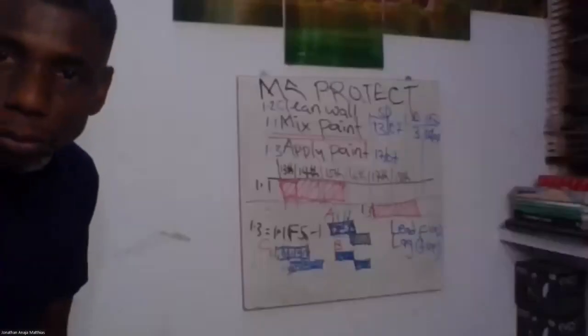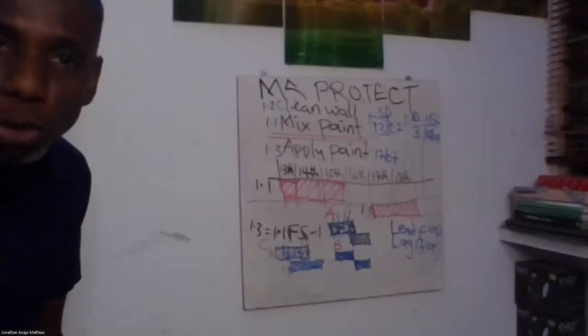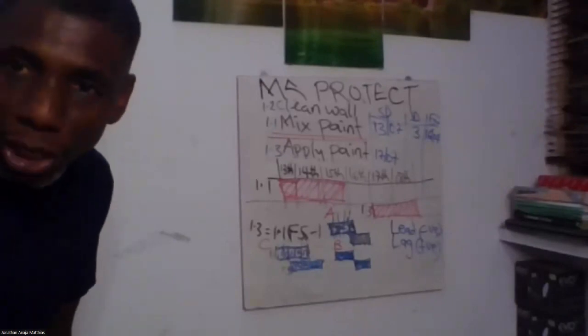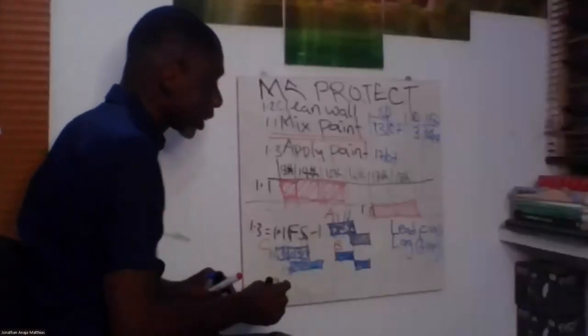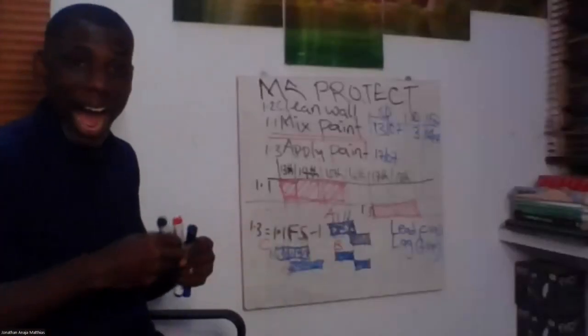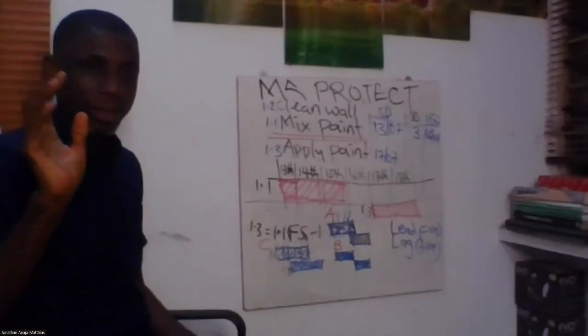Okay, 3 days. Yes. So can somebody explain this now? If you want to give instruction to MS Project, how will you go about it? 1.3 equals 1.1 FS minus 3. FS minus 3. Beautiful. Now, immediately you enter that command, like magic, you will just see your bar move like that.